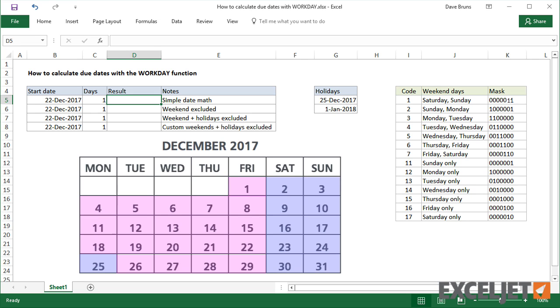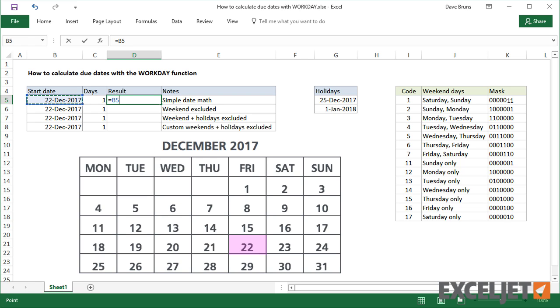Now to review, date calculations can be really simple. To add one day to the date in B5, I can put one in C5 and then just use the formula equals B5 plus C5. And this gives us December 23rd, as expected.